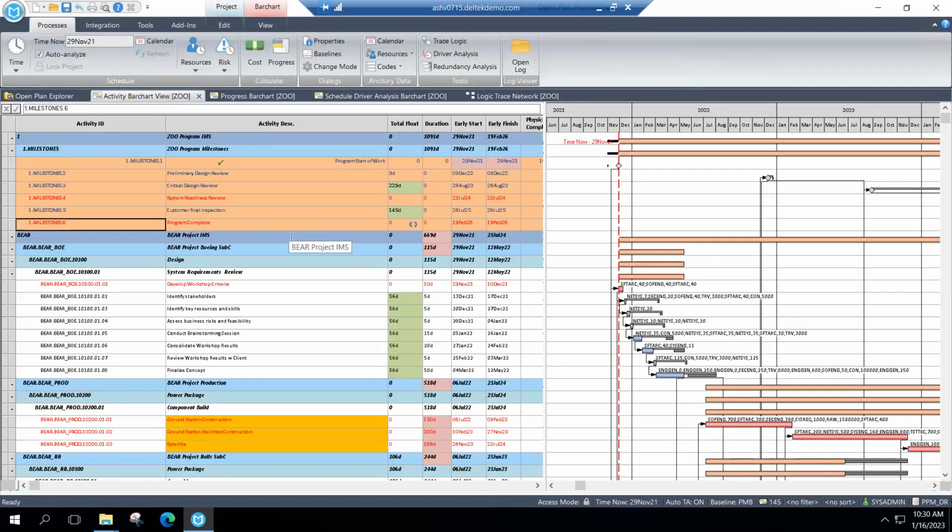And then plus, for my own benefit, being the owner of the IMS overall, I'm responsible for this program. I'm always going to be aware of who's impacting who, if the critical path or even the driving path to one of my interim milestones or handoffs or gates that I might have, I'm going to be able to see that because I'm pulling in all of my sub-project schedules all into one singular location and making sure that it accurately reflects the work that's going on in my program.